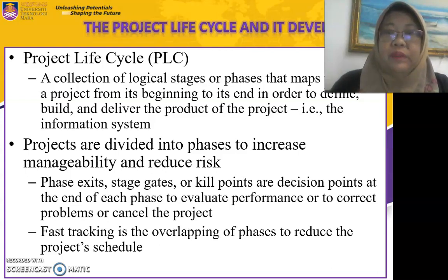Apart from it, projects are divided into phases to increase manageability and reduce risk. There are several terms that we use in project phases, such as phase exits, stage gates, or kill points. And there are actually decision points at the end of each phase to evaluate performance, correct problems, or cancel the project.